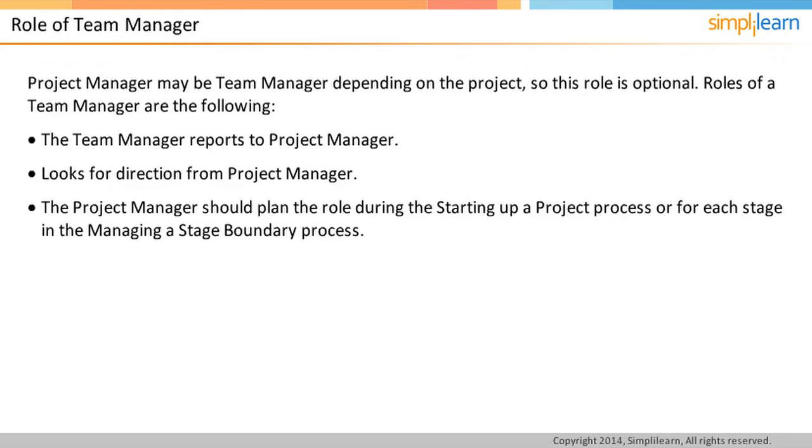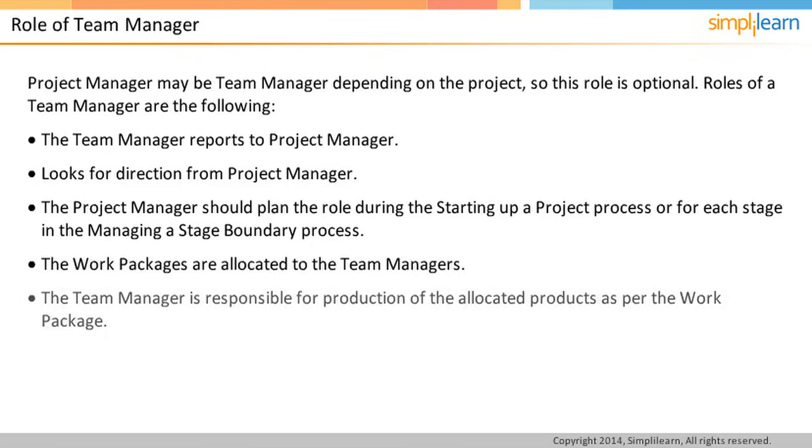The project manager allocates work packages to team managers or team members. The team manager is responsible for production of the allocated products as per the work package. The projects are usually executed in customer-supplier environment. The team manager may come from the supplier corporate organization. In this case, there could be a reporting line to a senior supplier.